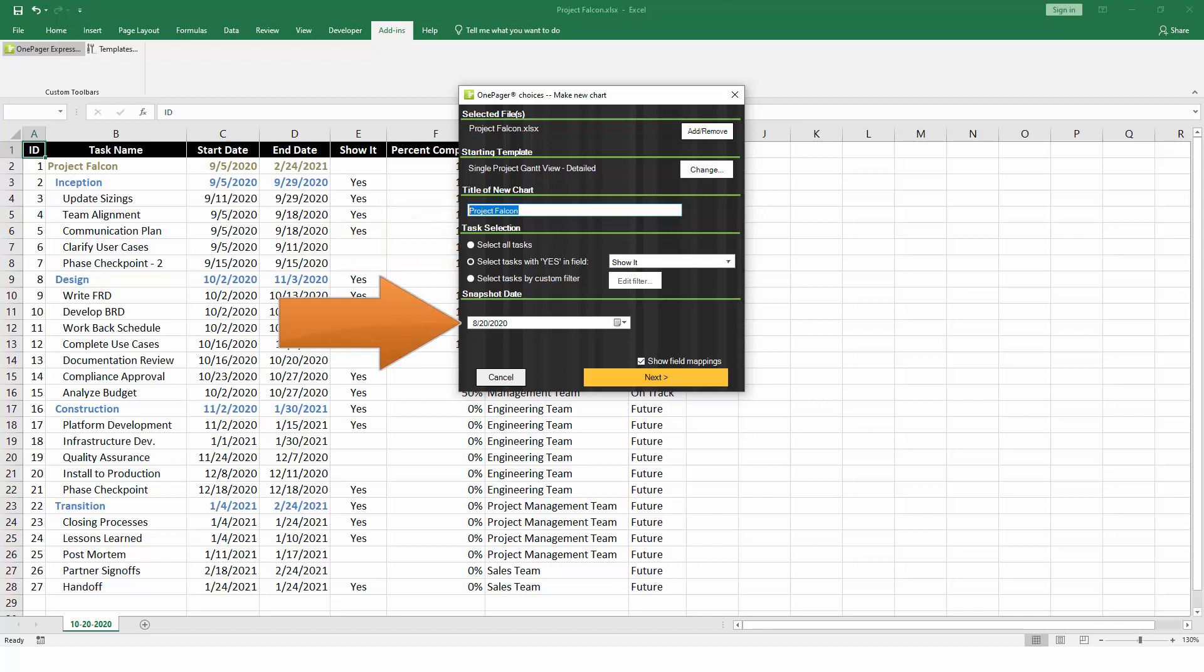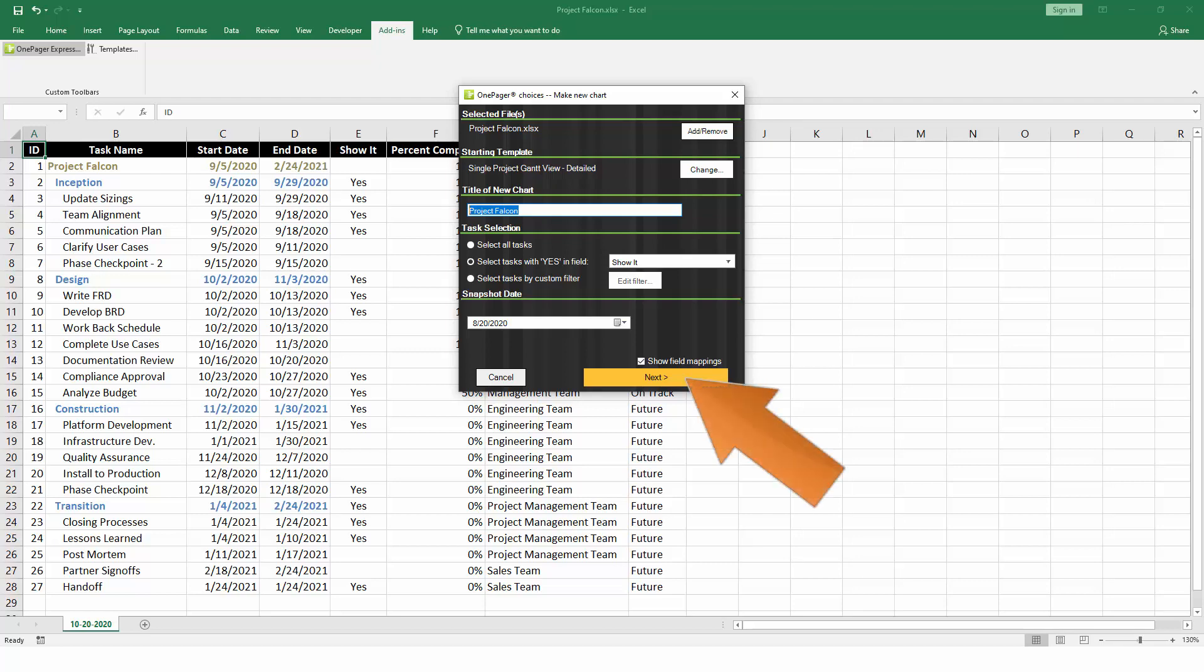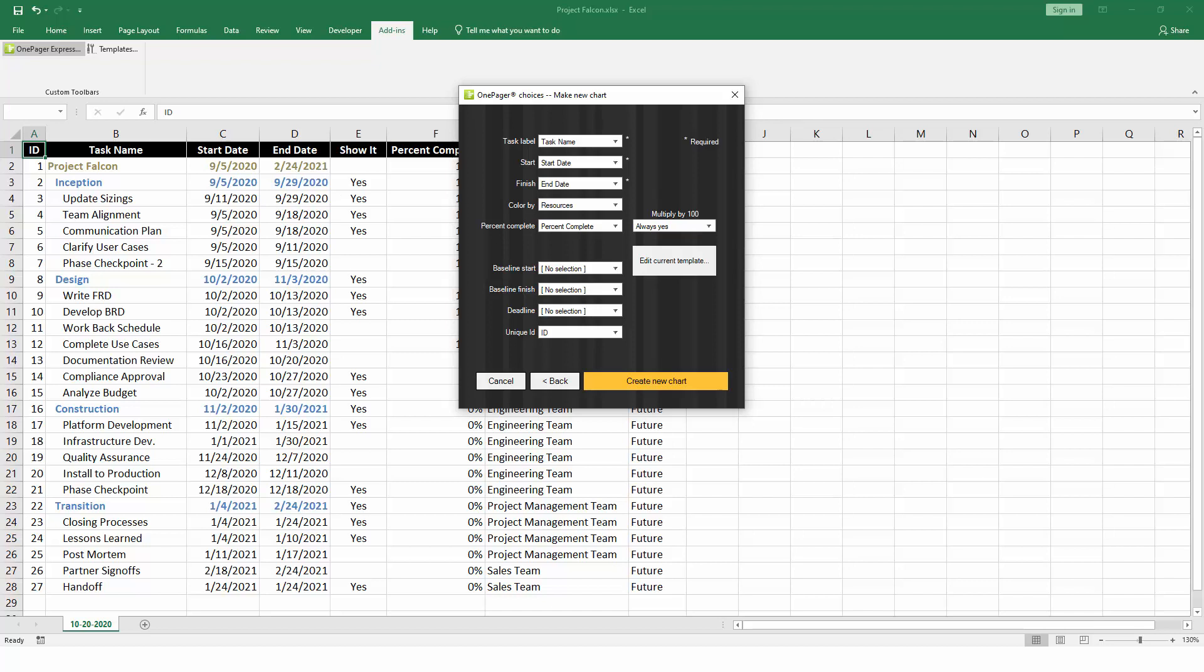Now, choose the date for your snapshot, which serves as the status date of your chart. Over time, you can add multiple snapshots to your chart at different dates and track those changes to your project. Click on the Next button to see which fields from Excel OnePager is planning to use in your chart. You have some flexibility here, but as discussed earlier, you always want to have something selected for the task name, start and finish dates, and the unique ID.